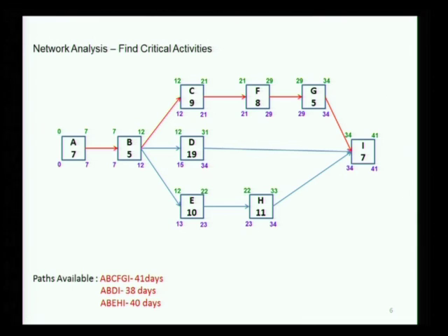The critical path will only change if I change any of the activities which are on the parallel paths. Okay. For example, if I change B, nothing will change because it is a predecessor to all the other activities. It will all be pulled. Similarly, I is successor to all the activities. Okay. So there will be no change in the critical path. Okay. So right now I we have taken out, and the path is still the same, and we still have this table valid.